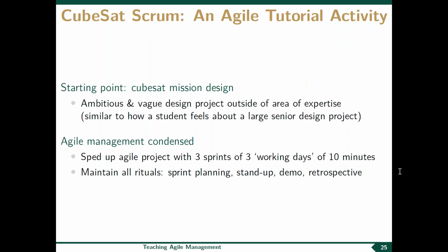And what we do then is, in this 3 hours, we speed up an agile project cycle. Three sprints, in fact. So three sprints, each of 3 working days. And of course, if you want to fit that all in a three-hour activity, then the working day turns out to be only 10 minutes long. So there's very quick turnaround. Students don't even have the chance to check their phone, because whenever you're checking your phone, you're losing essentially a quarter of your working day. It maintains all of the rituals of agile management. It maintains the artifacts like the Kanban board.